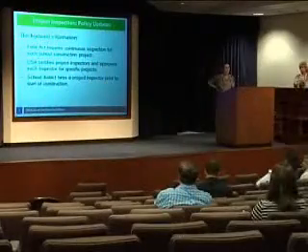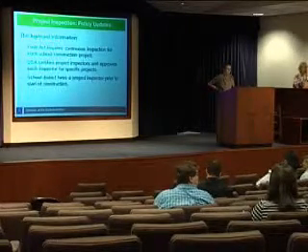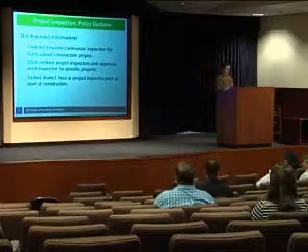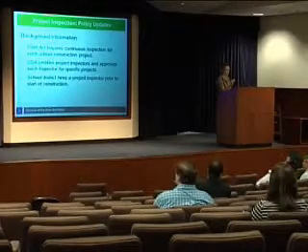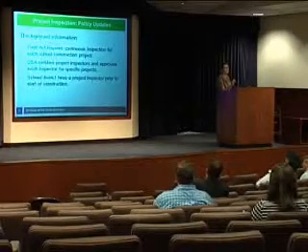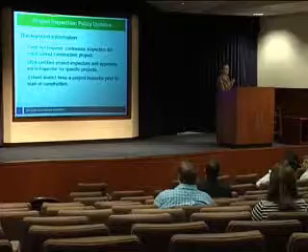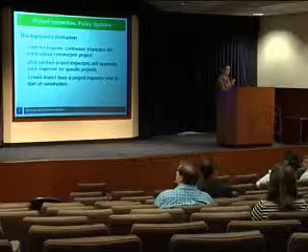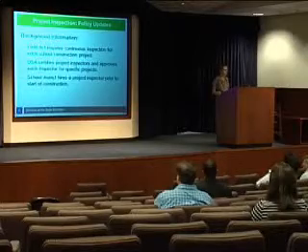This is just some key facts for folks who may be new to the program and are not familiar with it. The Field Act, which sets the practices for school construction, requires continuous inspection for each school construction project. To accommodate that, DSA certifies project inspectors in 4 different classifications, and then each project inspector additionally is approved for each project that he or she wants to work on, as hired by the school district and approved by the architect. The school district must hire a project inspector prior to the start of construction. Construction cannot proceed without a project inspector on site.